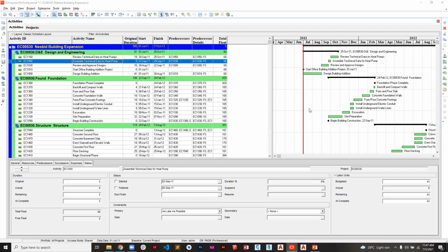Okay. We said activity constraints put conditions on the start or the finish date of an activity. So on the start date, if you say that this activity has a constraint of a start on, and you select a particular date, it means that in either way possible, that activity should start on that date. Then if you say that it is a finish on, it means that activity should be finished on that particular date.